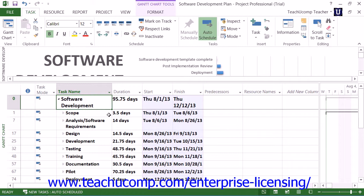In Microsoft Project, you can create the lists of resources that you will need to complete all of the tasks within the project file. The tasks that are required to complete the goal of the project must be able to be scheduled in a chronological sequence that allows you to see when the project will be completed. When you create the tasks in Microsoft Project, you assign resources that are available to complete the tasks. Once you have entered all of the tasks required to reach the goal state of the project, you will also be able to see the end date of the project.